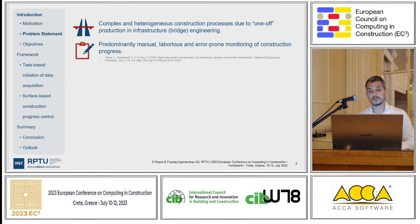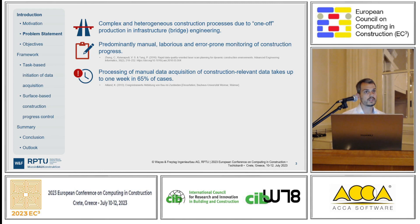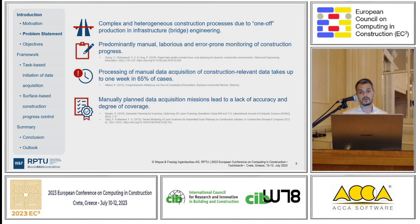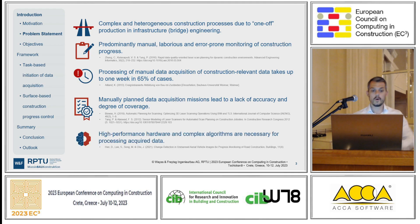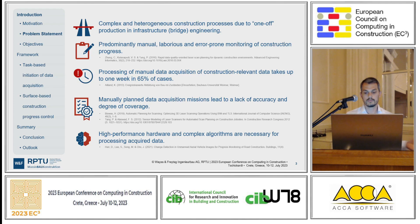The predominantly manual and error-prone monitoring of construction progress is also another problem. It is done manually and it's time-consuming. Due to one paper I've read, it takes up to one week in 65% of cases to get data from the construction site to the office so you can process them. And just imagine data is one week old — you cannot use it at all because it's just wrong after one minute. Manually planned data acquisition also leads to a lack of accuracy and degree of coverage, and all the other research I've read requires high-performance hardware and complex algorithms, training data, synthetic data, real data for processing the acquired data. So my focus is not to use high-performance hardware and complex algorithms, but to do a lean construction progress approach with smart considerations.